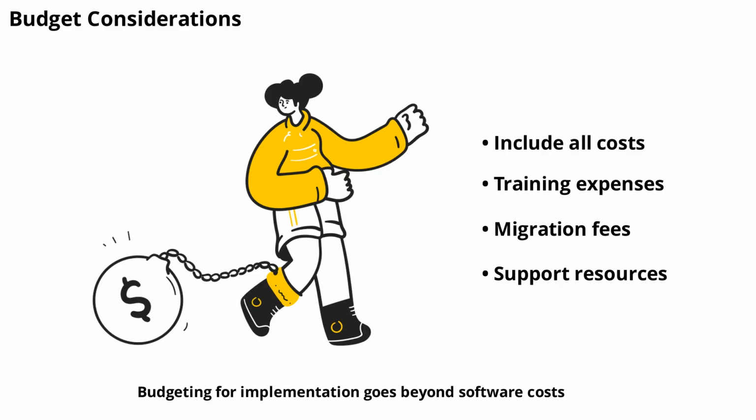Budgeting for implementation goes beyond software costs. Factor in expenses for training, data migration, integrations, and ongoing support. A comprehensive budget helps avoid surprises and ensures you have the resources needed for a successful rollout.